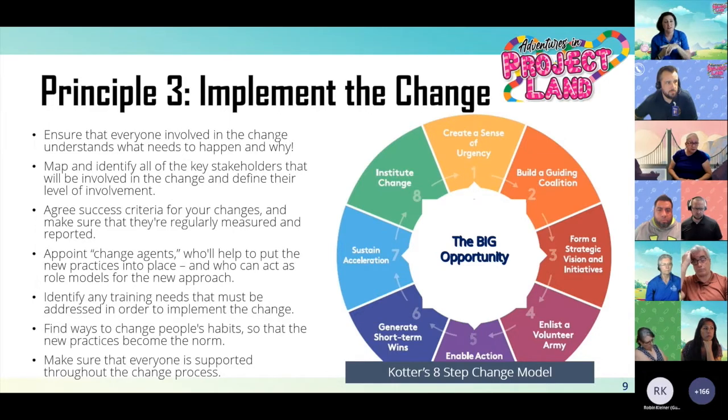We've used the same model again in our Adobe Sign implementation. So again, working with each district to implement Adobe Sign, we have champions or change agents in each division who, again, help us communicate back and forth with the division, bring questions forward, take information back, and kind of help model and steer and guide the change for their department. So you could envision this working maybe at your schools, maybe your principals, maybe your office staff might help be change agents for some of your projects.